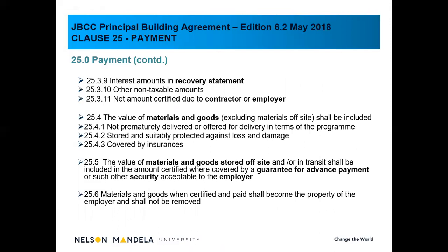The interest amount, I've mentioned that 25.3.9, the interest amount also in the recovery statement. We'll talk about the recovery statement. It is part of the payment certificate. You'll see when we do the actual payment certificate itself, there are various certificates that we need to complete, and a recovery statement is one of them. A recovery statement in a nutshell is almost a summary of the figures related to penalties, default interest, compensatory interest that is already included in your payment certificate, the main certificate itself.